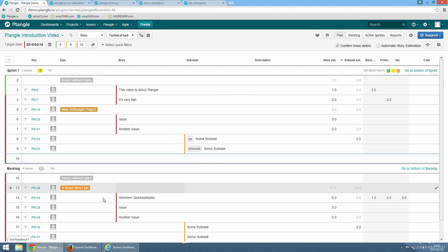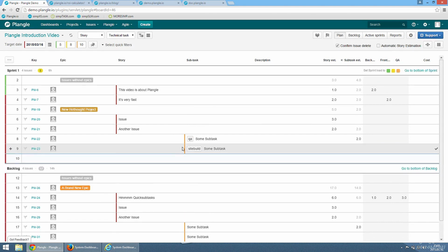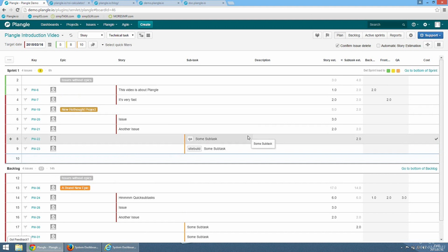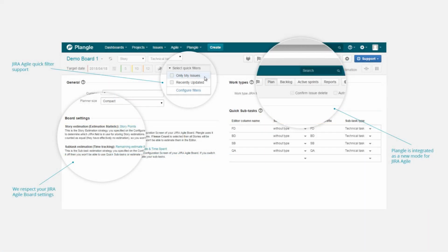And even with the perfect client in mind, who just pays without questions, it is good to think about the overall progress of the project every 2 or 3 sprints and update the velocities so you can have a better prediction. Plangle is all about the speed provided by the tight integration with Jira Agile.